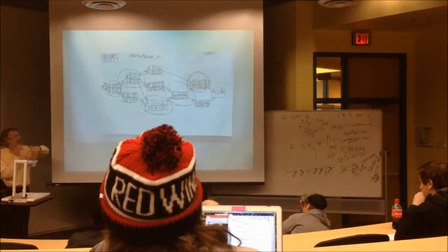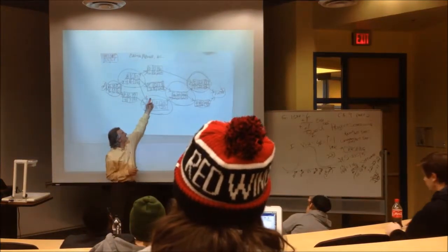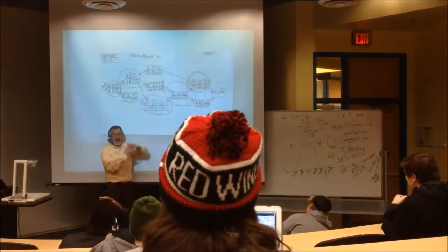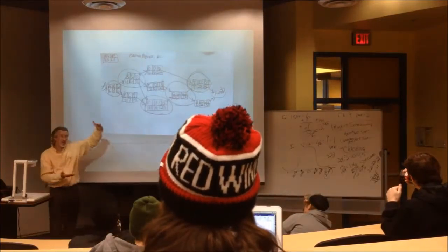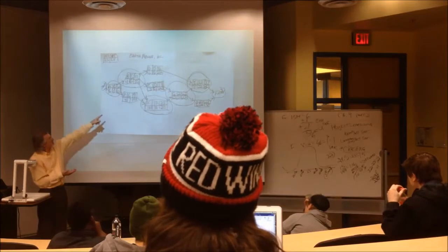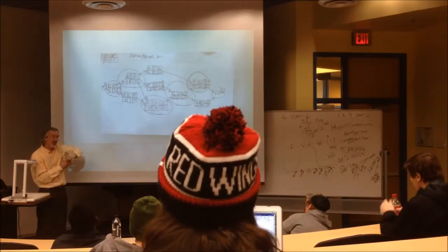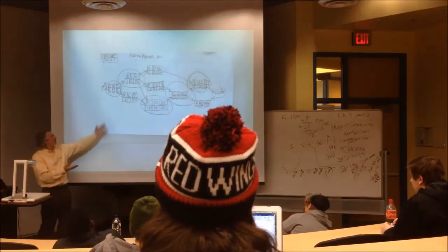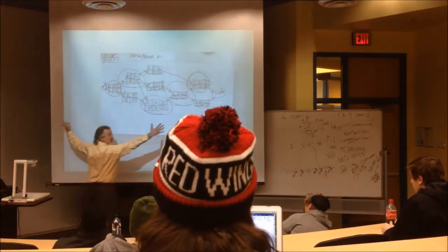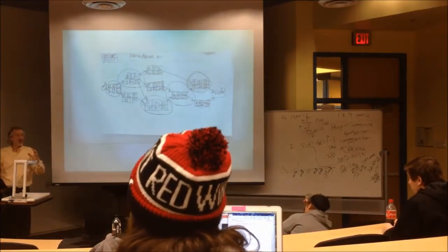So it could be very expensive on a project that has, where's that one that had a pump? E has 7 units of slack. Now it may look like the lowest cost activity that you want to attack to try to crash this, but you've got to crash all 7 of those units of time before you really crash the project. You've got to take that into consideration. And so, usually, you got to remember, there's like 50 of these activities. So the math on this looks like,